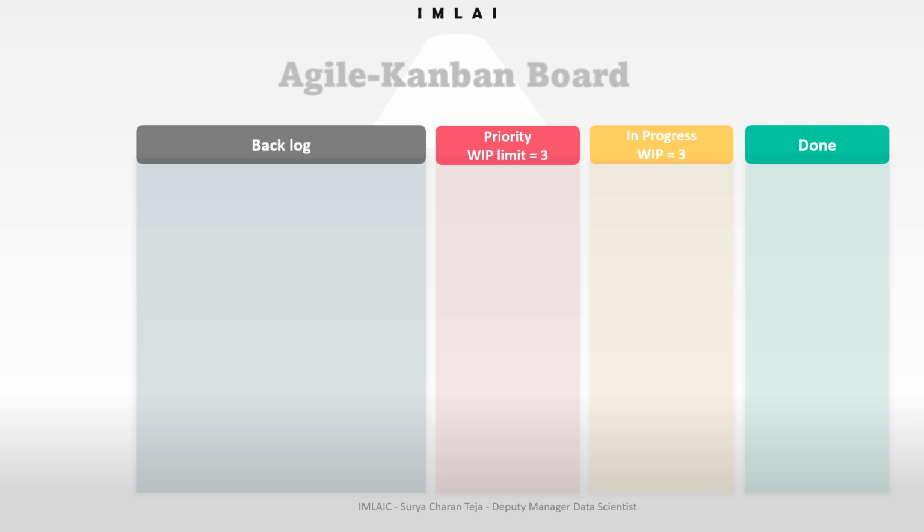The Kanban method was designed as the complete opposite of that: a non-disruptive, evolutionary method for improvement that allows teams to deliver continuously rather than in time frames of 2 to 3 weeks, receive feedback faster, and shorten the time it takes to offer value to customers.